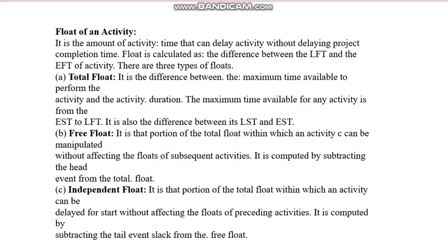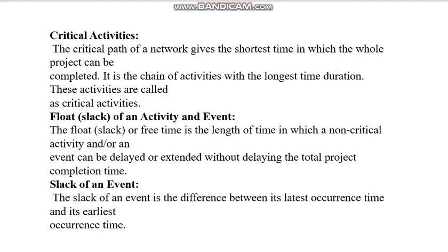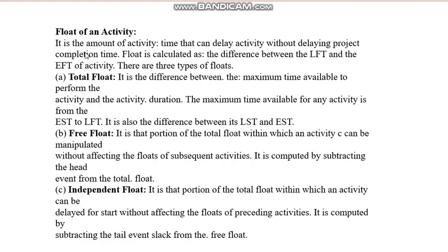Next, float of an activity. Now here is the float of an activity. It is the amount of activity time that can delay the activity without delaying the project completion time. Float is calculated as the difference between LFT and EFT of an activity, latest finish time and earliest finish time. The difference of this is the float, or the slack.